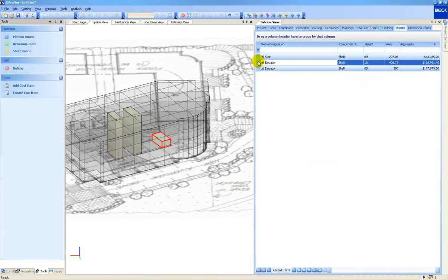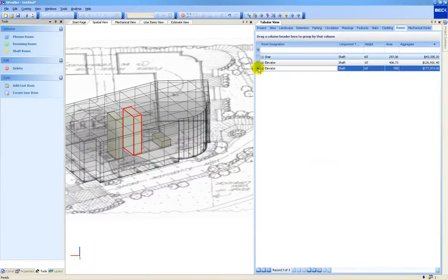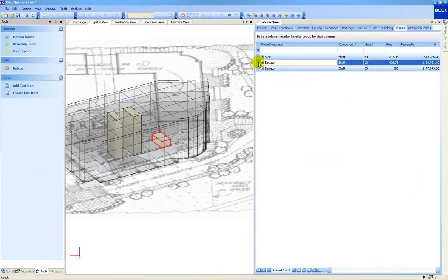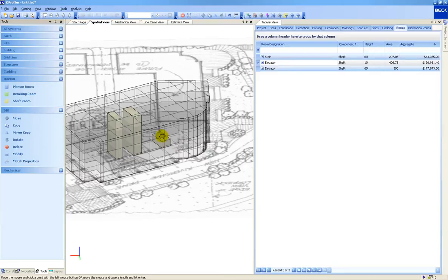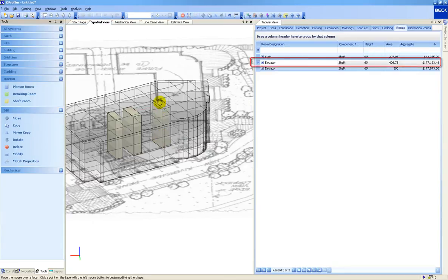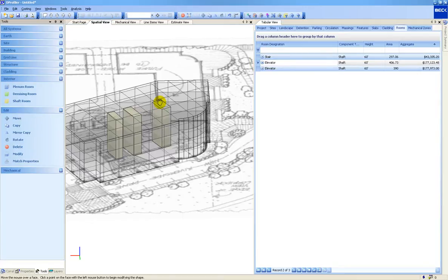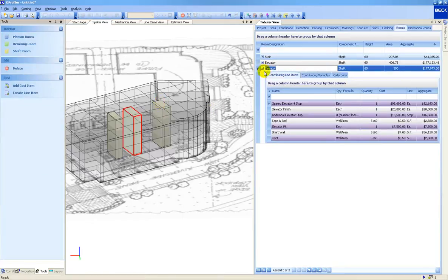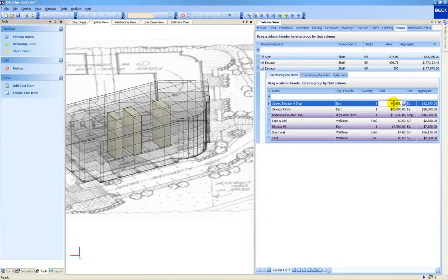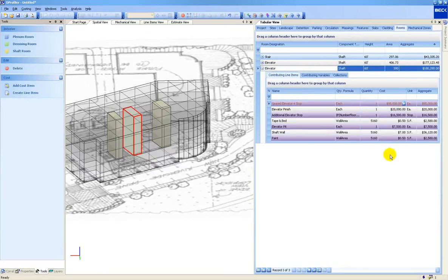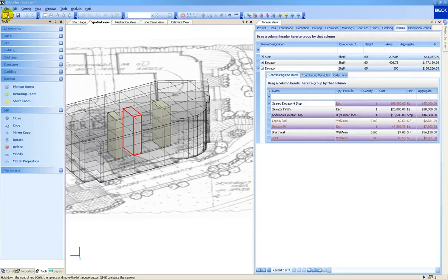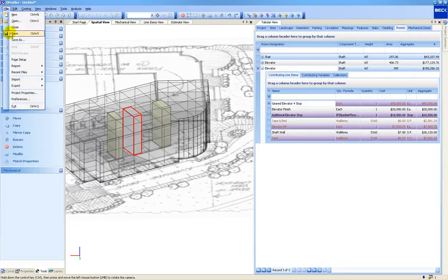It is this unique capability that enables users to quickly run through many project alternatives. The cost data used in dProfiler is 100% customizable. The system is available with several different cost data options, such as importing from Excel, connecting to Sage Timberline Estimating, or RS Means. Due to the conceptual nature of dProfiler, the cost data setup is relatively simple as compared to detailed estimating requirements.